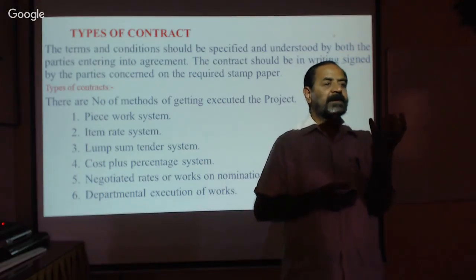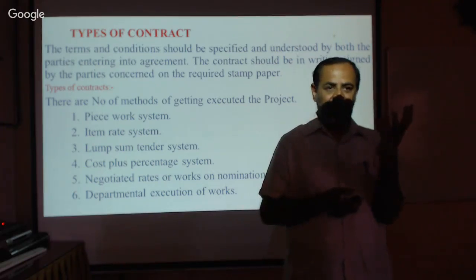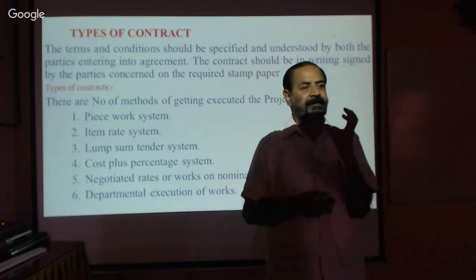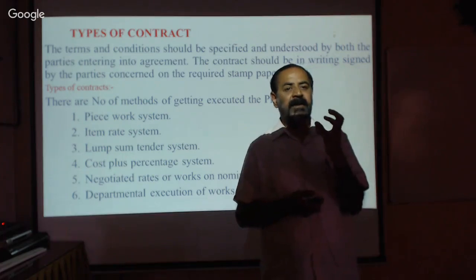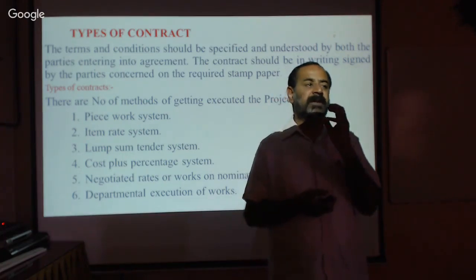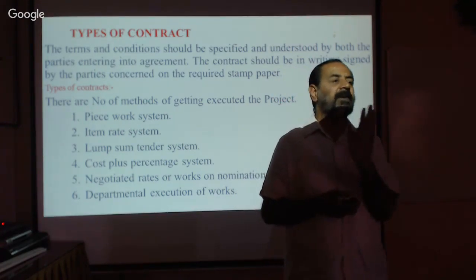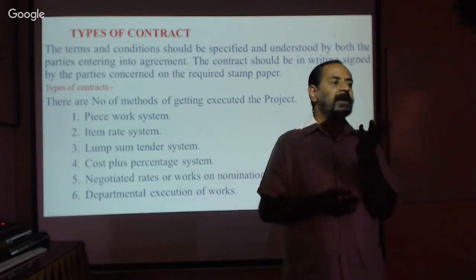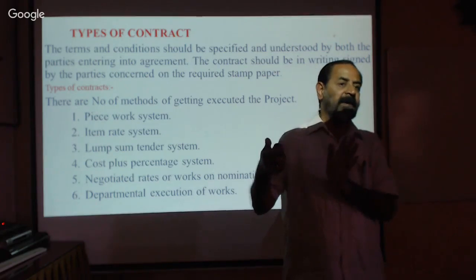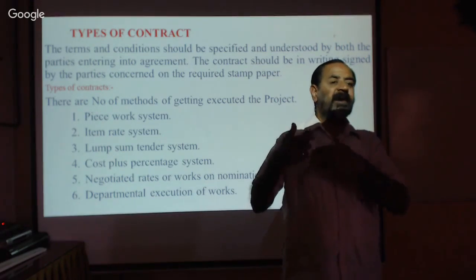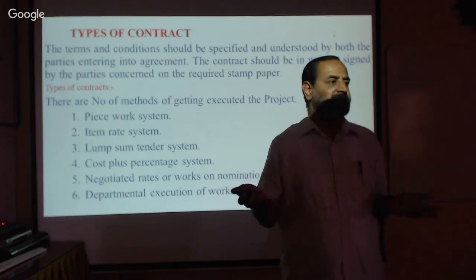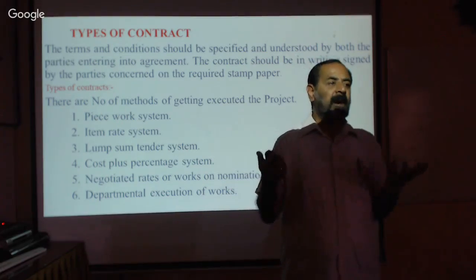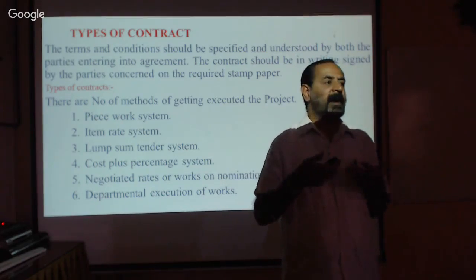For each quantity, there will be a scheduled rate scheduled by the department. Public Works Department is scheduling, we have a schedule of rates, yes sir. Normally we will call it as schedule of rates. Now every year, the concerned department, authorized department will revise the rates according to the market prices, according to the labor available in the market.